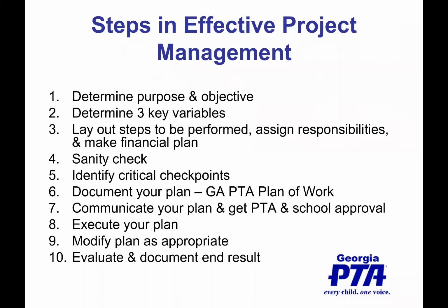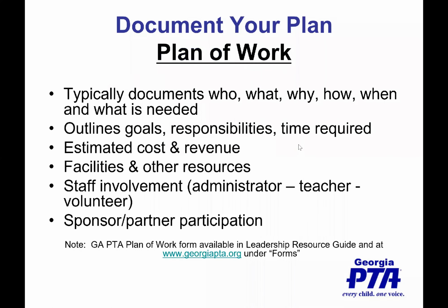Execute your plan, modify the plan as appropriate, and evaluate and document end results. That is very key, because when you have completed everything with the committee, make certain that the committee chair gives you an end report, and it should document everything from the beginning to the end. This will be useful and helpful for the next committee person that steps in, and if they decide to do that event again, that will be a starting point or a guide for them.